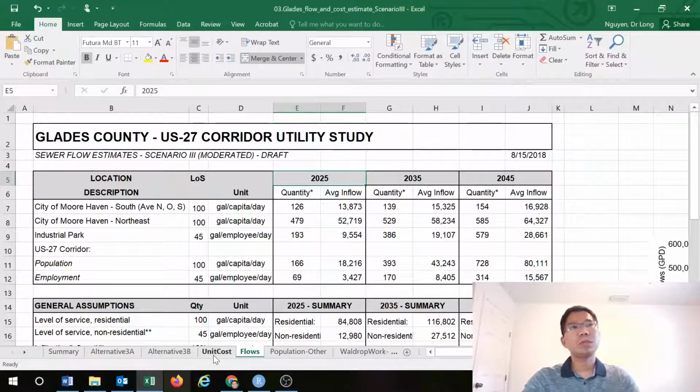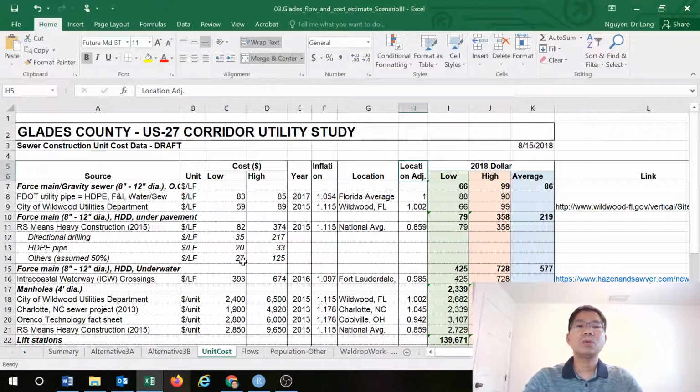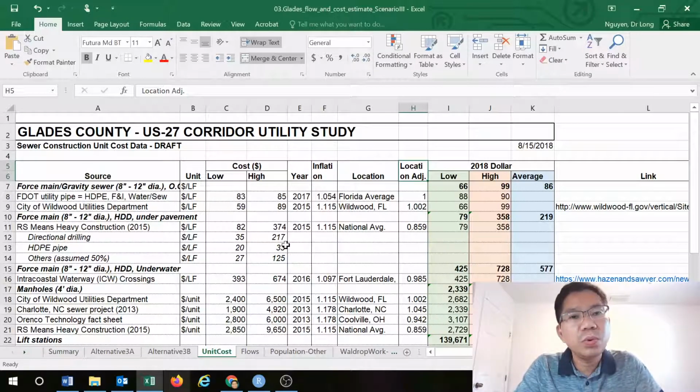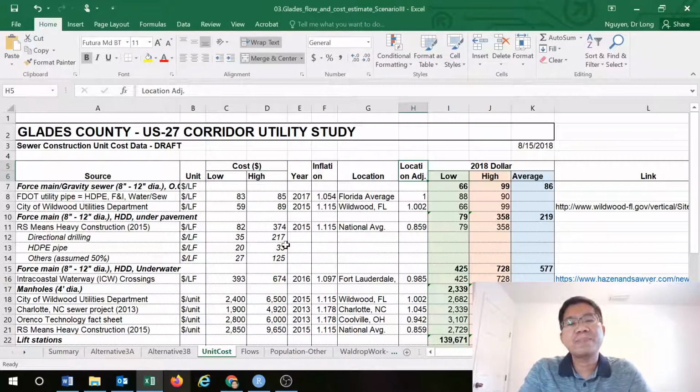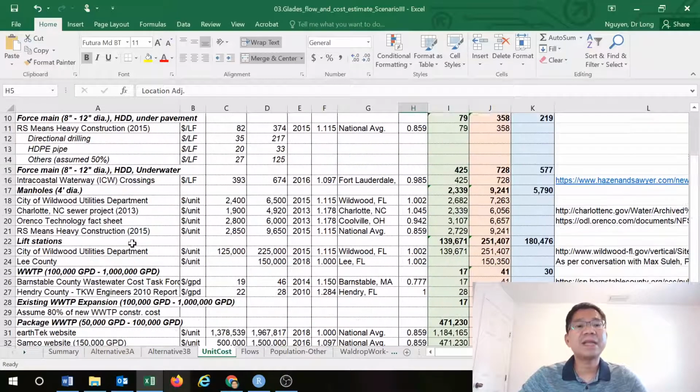When you have the flow and you also investigate the current capacity, we can determine what should be needed. With that we can also determine the costs. Of course, at this point we don't have the engineering design of the wastewater or water treatment. So what we do is use the material we learned in lesson 3, the order of magnitude estimate, to estimate the many items involved.